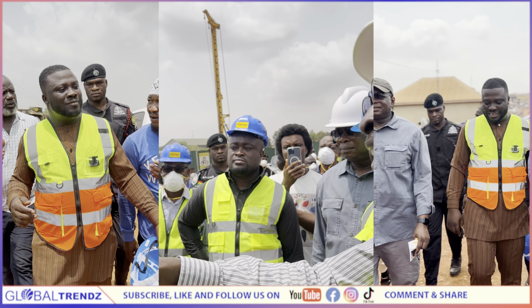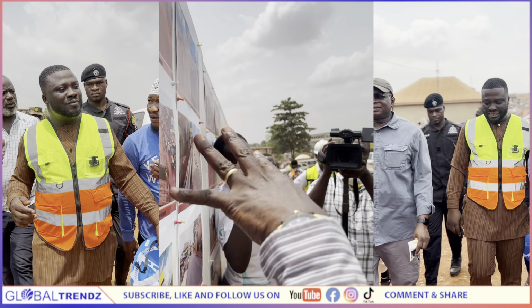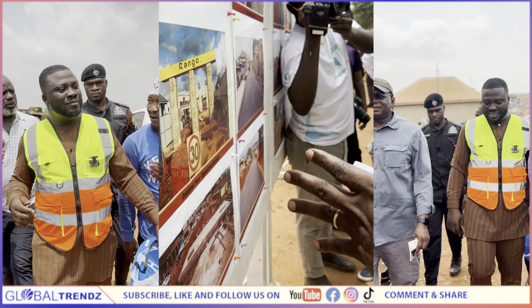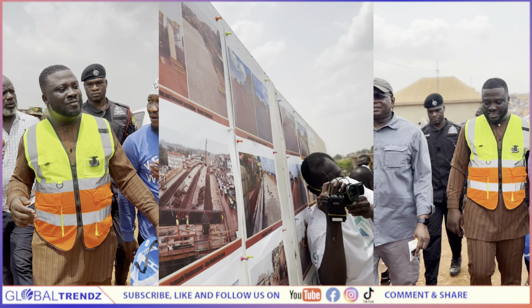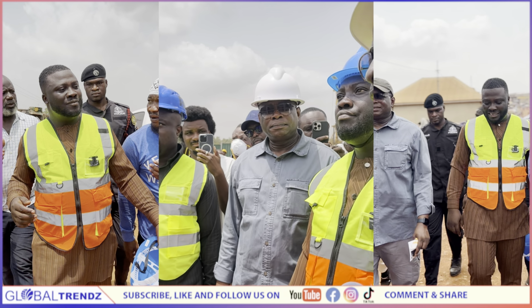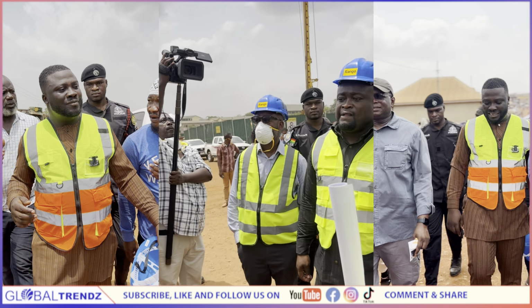Once they have finished casting the deck, they will take all the formwork and everything and bring it to Amoakohene and start work there. Once they take all the formwork, they will also start work on the approaches of the overpasses over there. So these are the pictures that we have shown over here.